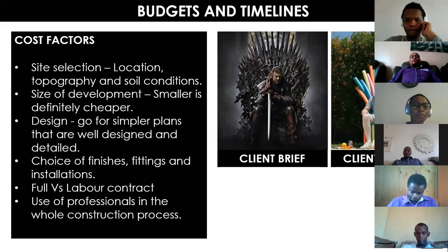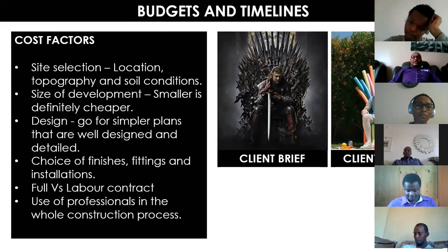The other question is, how do you go about contracting? Do you give out a full contract? Do you give out a labor contract? As I'd mentioned initially, when you give a full contract, essentially you're not the contractor. So the contractor is spending their time, effort, and resources. So you pay them, and it's usually a percentage, which is the profit.